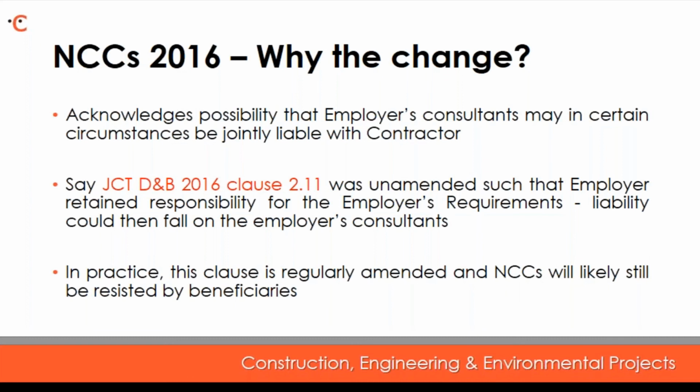Normally, the standard position in the contract is that the employer will retain responsibility for the employer's requirements, and in that event, liability could, in theory, fall on their consultants for any mistakes in that document or documents. But as I'm sure you'll all be aware, this clause doesn't normally survive into a final contract without some form of amendment. It's something I will go into a little bit more detail about, but the main point is that as a result of this, net contribution clauses will likely still be resisted by the beneficiaries in any contract of a design and build nature.